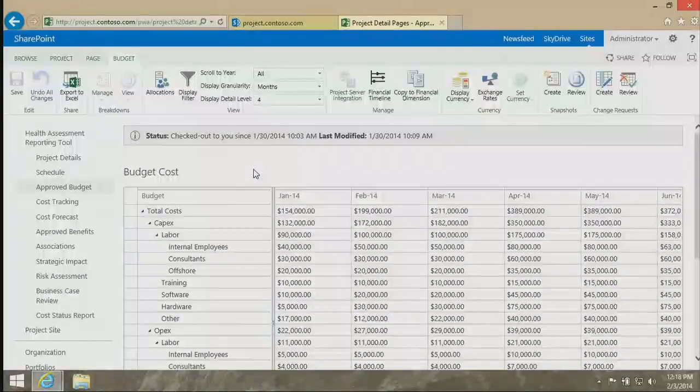I'm going to say yes. Let me just replay the question to make sure I understood it. What we tend to see is obviously the system of record providing the committed costs for that period, right, from the ERP system. And then you have the ability to add your accruals. Now, the way I showed it configured today was I simply would overwrite, as you saw. There was one actuals column. I could come in and update that.